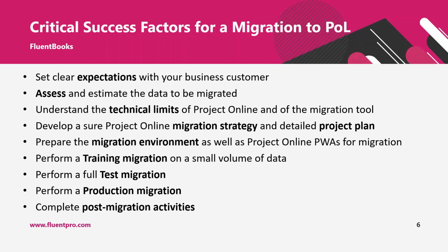Part of these trainings can be done after the test migration is completed, because you will have a Project Online PWA with a complete set of your production data from your old environment. So this PWA can actually be used as a sandbox or as a dev environment in future after you go live. Also, if you need to develop some new reports, this can also be done as a post-migration activity.